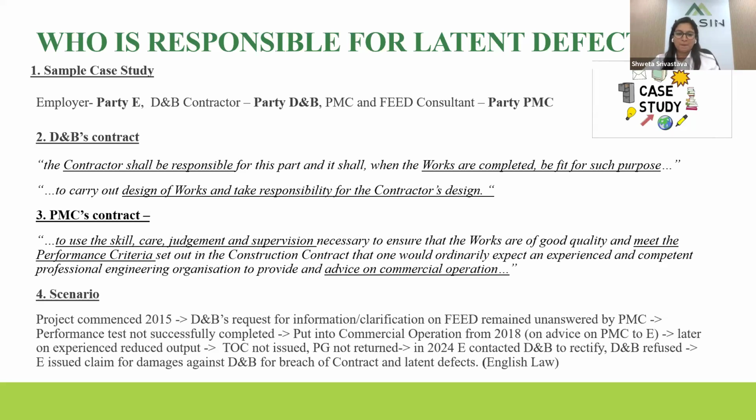No, I think you've covered it well, Richard. Certainly exclusion clauses within the contract are key to look at, when there is an exclusion against consequential losses or other similar loss of profit or whatever might flow from defects. But otherwise, certainly in English law, the usual principles of remoteness and what flows from the alleged breach apply. Of course, this will vary if you're looking at something under different law. I know that under Emirati law there are sometimes even tighter restrictions on what can be recovered. Of course, I'm not an Emirati lawyer, so not an expert, but that is from my experience in arbitrations. So it can vary.